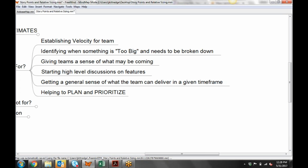And the way that we're going to deliver on time box estimates, something that has a deadline, is to say, here's the prioritized order in which we're working things, and this is our level of confidence with each thing. As you go down that list, our level of confidence should drop because there might be other factors that are higher up in the list. Doesn't mean we're not going to be able to accomplish it.